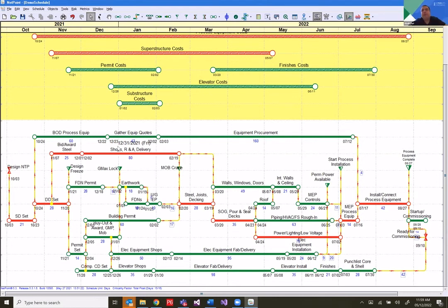On the import from P6, NetPoint basically just takes the data date and the new duration. So if the activity is 33% complete in P6, the duration for it automatically gets updated. That means 33% complete when it should have been 50%. Its duration gets updated based on that, the remaining duration, and that remaining duration is accordingly imported into NetPoint. But yes, the actual % values don't really get imported into NetPoint.